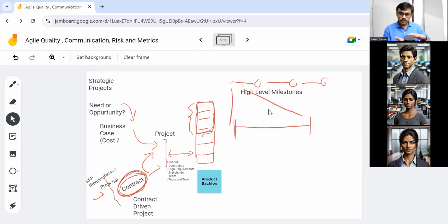So actually you have to create your hybrid approach where it will say, we have a baseline scope to start with, for example, but our executions are incremental. We have incremental releases for internal evaluation and continuous feedback and continuous integration with other vendors for risk mitigation purposes. But if you have a change idea, if you have an improvement idea, that will not directly go into the backlog.